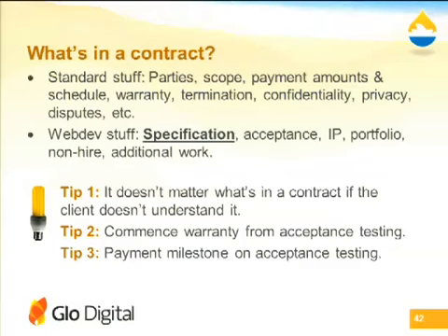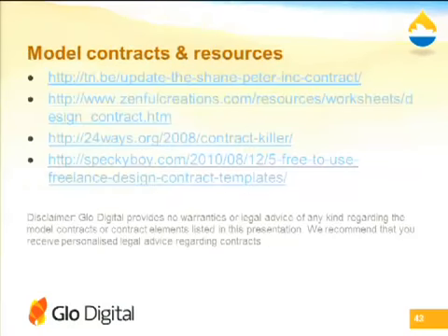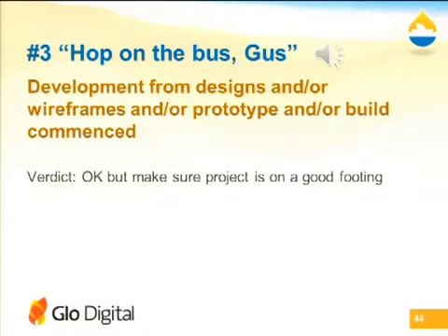Yeah, I think I was looking at the contract that we actually used, and it has a generic scope section, which says this is a website development contract, blah blah blah, legal stuff. And then in the addendum, the schedule, we define in more detail what it is, and that usually refers to an external document, which is like a specification document anyway. And have a look at the resources. There are some good contracts out there. I suggest you use a contract. Very important, contract conditions. And that was my coverage of contracts, Ryan, because you put that comment on the page. That's it. No time for anything else.